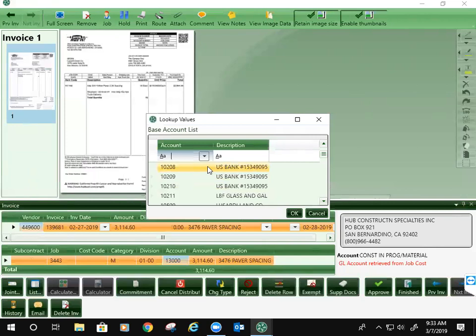Is the cost coding the same as what we've already established at Timberline? Mm-hmm. So all those codes are in there. What if we wanted to add codes? If you add codes, you have to add codes in Timberline first, because this is a mirror image of Timberline. It's basically drawing everything from Timberline into itself. So when you make updates like adding a change order, it has to go back to the Timberline software first.